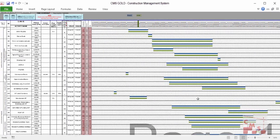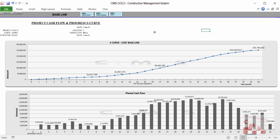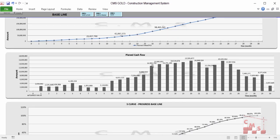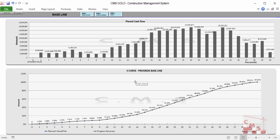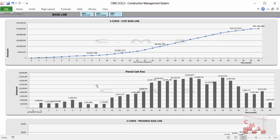CMS produces a bar chart for all projects. You can also manage and modify your time schedule according to your project constraints, as shown in the course. After developing the schedule, CMS will automatically produce a cost baseline and monthly cash flow, indicating the required cash flow at peak and for every month, and the percentage of progress required every month.